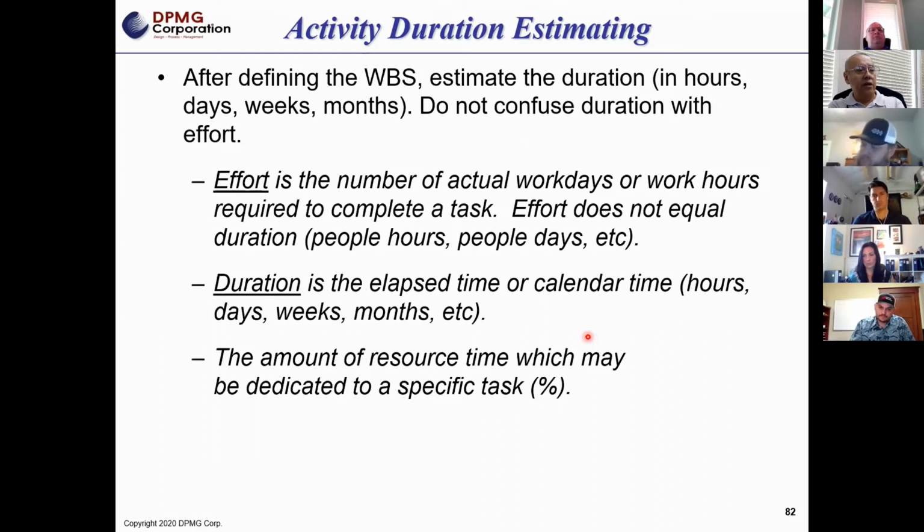So you have to be real clear, and then you need to tie that back to the financial piece. In many cases, contracts are written that say we will pay you up to less 10%, because we want to make sure everything gets completed. When everything, quote unquote, is completed, there's a period that we'll evaluate and then pay you the residue, or the rest of the contract, or a percent of the contract. That varies also. There's a variety of ways you can write contracts to ensure the work gets completed, but you have to be really clear, because it becomes a back and forth.